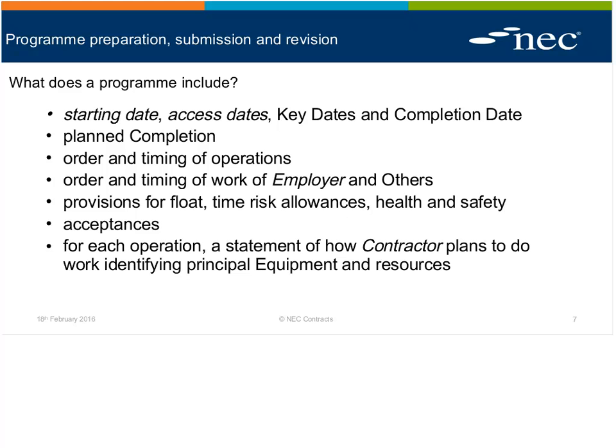I don't know how pragmatic you'd be, Rob, but I don't think this means complete full-blown detail from day one. I always see it as more of a bow wave. So as you move through time, you get maybe a month or two ahead of good detail. That's an interesting one. So you grow into your program.